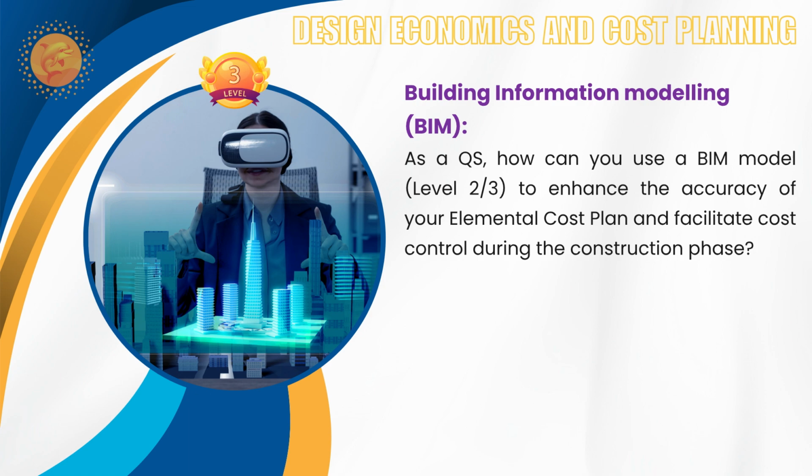So when a change is proposed during the construction stage or anything, the QS can quickly run a change control report to see any cost or program impact. You can extract that from the BIM itself. That enables informed cost control decisions in a timely manner, without taking too much time to make decisions. You can do it immediately with the help of BIM.